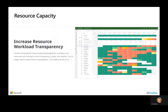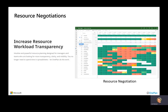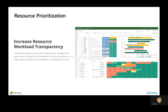Resource capacity planning is added by OnePlan for time-phased resource capacity planning, whether in terms of FTEs, hours, or percentages of allocation, to see where we might be overloaded in our overall project mix. The ability to have resource negotiations facilitates the interplay between project managers and the functional organizations that supply the resources. Resource prioritization takes the mix of portfolio and resource planning together, seeing if we have the resources to fulfill a portfolio and prioritize projects based on our ability to deliver — using what-if scenario mode to compare and select from alternatives.